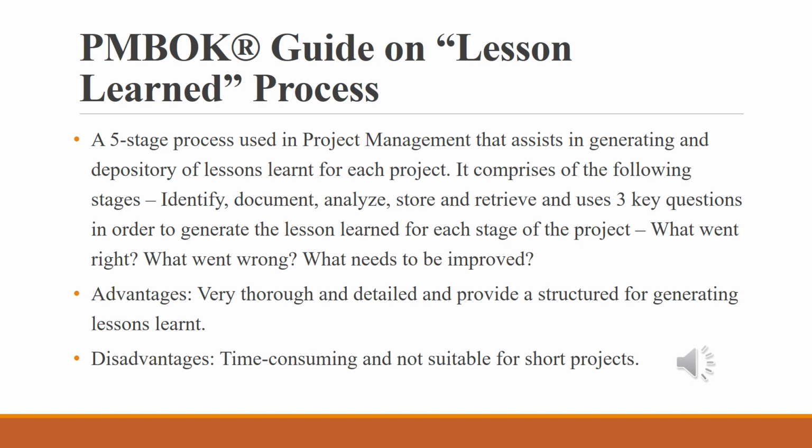I hope you find this video useful for your write-up of the lessons learned using the GIBS reflective cycle. Another approach that you may want to consider is the PMBOK guide on lessons learned. It's a 5-stage process most commonly used in the project management field. It allows you to generate and deposit lessons learned for each project. The 5 stages are identify, document, analyze, store, and retrieve.